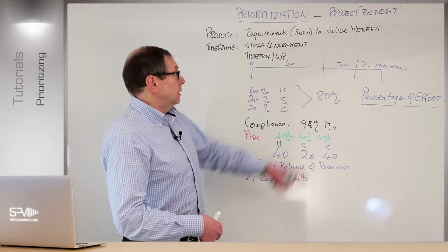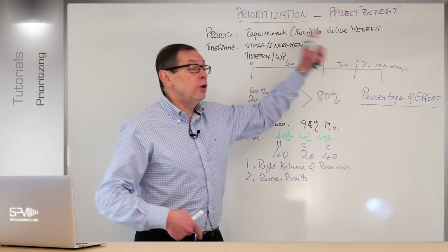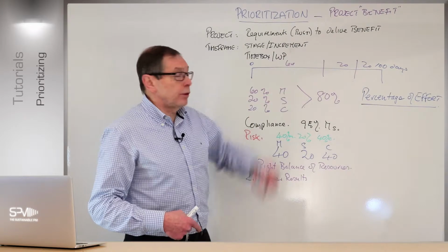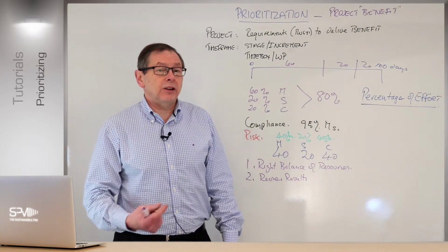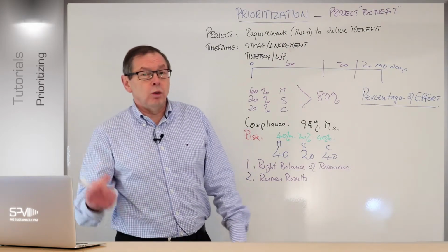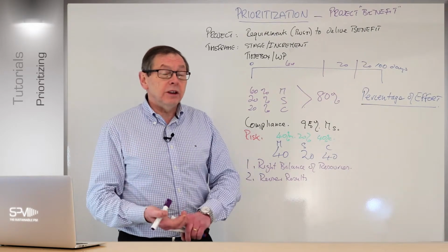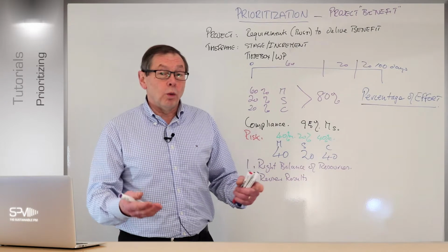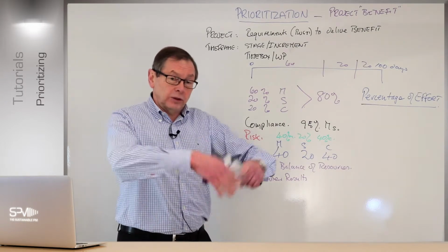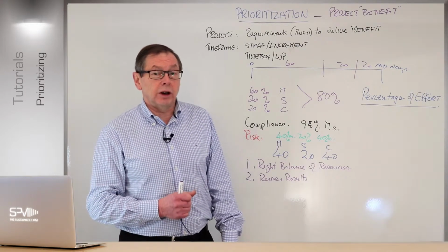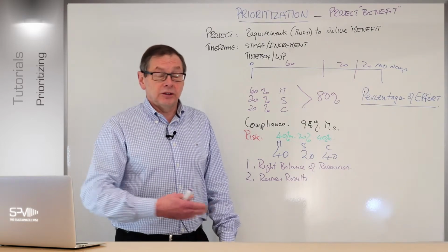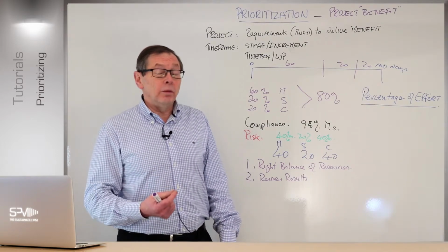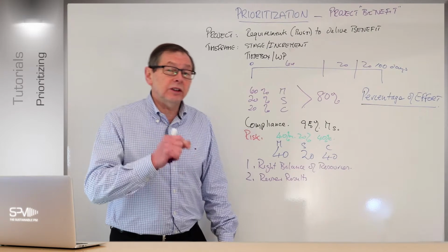Okay, so what is important when we do prioritize is that it is done with the project's beneficial change in mind. That's the key element, not what somebody wants. But there are some issues in the requirements in there that might have that. For instance, if the business have won an award that needs to be on the website because that's what's promoting their new products, that has to be there. Technically, it has no impact at all. But from a business perspective, it is key.